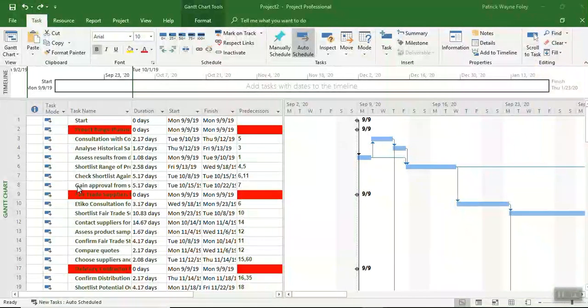In this second video, we build on what we have just done. So we've taken information from our Excel sheets, we've pasted in the tasks, we've pasted in our duration, taking note to make sure that when we are talking about the deliverables, we've set the time to 0 days. It's also important to realize that we have set up this scheduling at the very beginning so that it automatically schedules from us, and we've set our date 1 year ahead so we don't get any elapsed time problems.